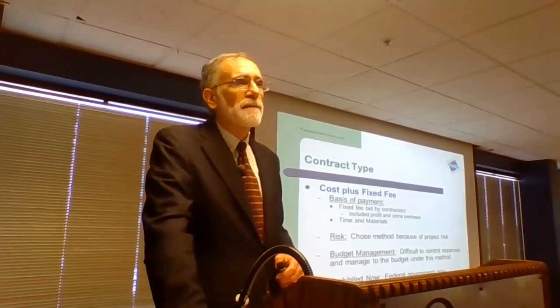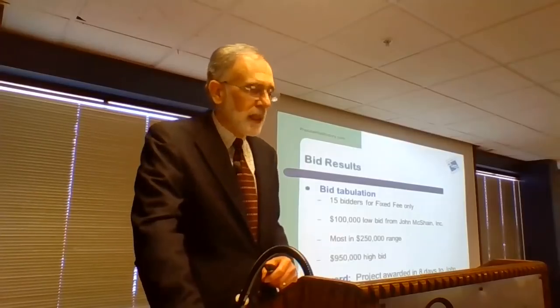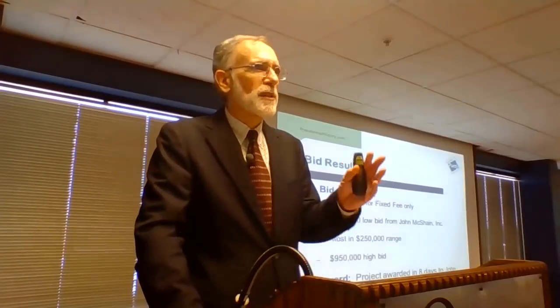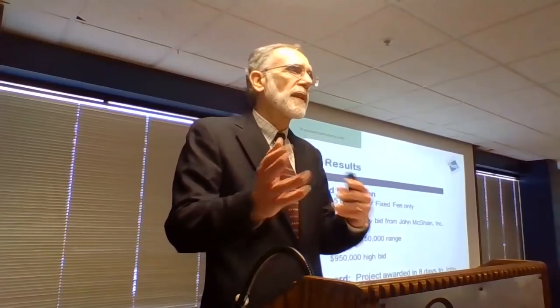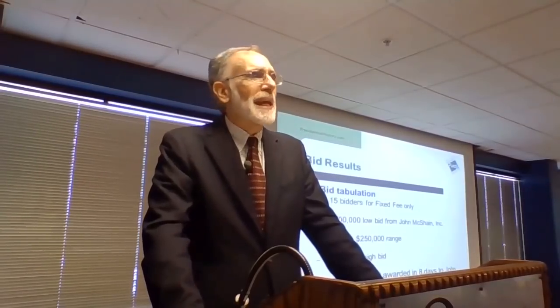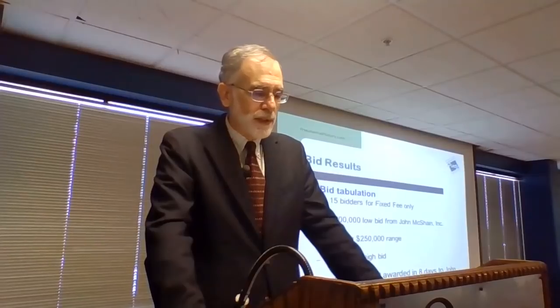So they pre-qualified 15 contractors. There were 15 bids that were submitted. The low bid was from John McShane Incorporated at $100,000. So that's their fixed fee, their overhead and profit. Most bids were in the $250,000 range, and the high bid was close to $1 million. They awarded the project in just 8 days after they opened bids. That's a very fast turnaround time.